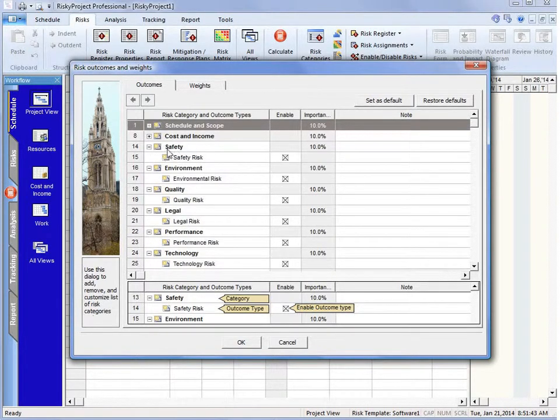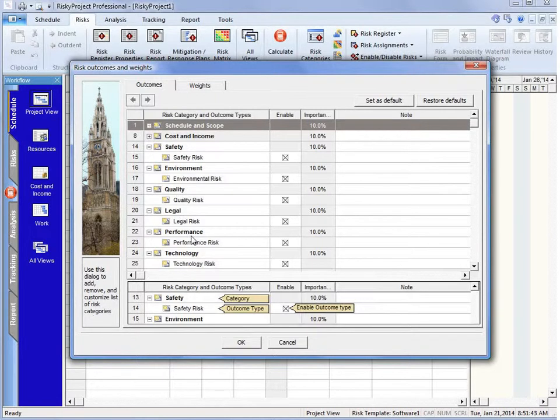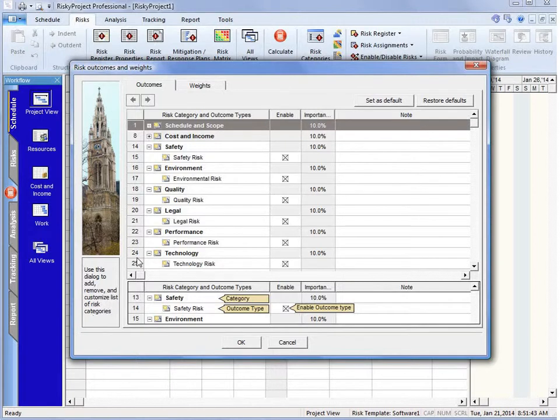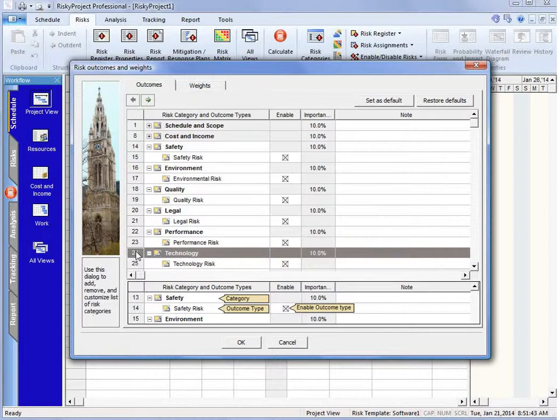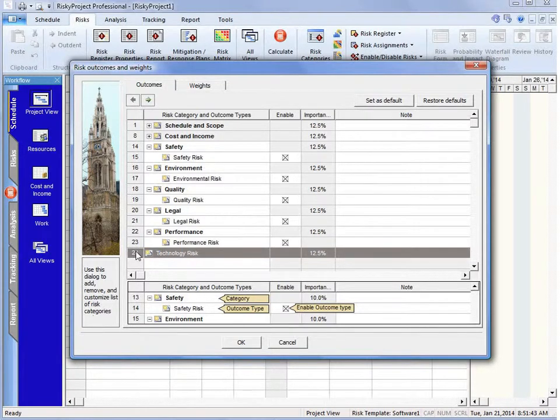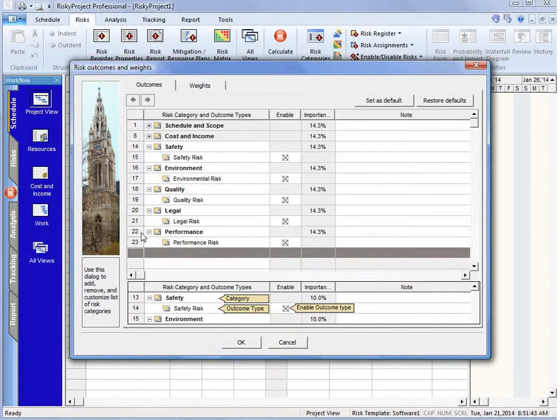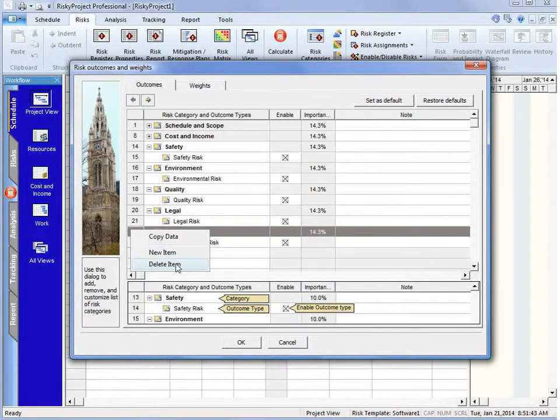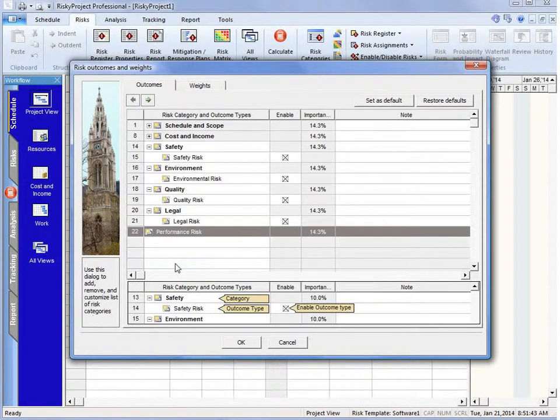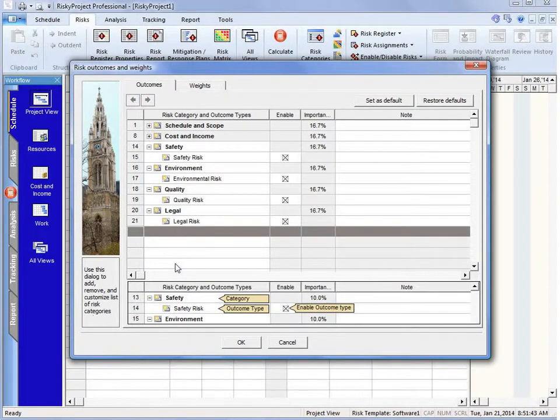But we can see that we have safety, environment, quality, legal, performance, and technology. Now if we don't want one of these, one of the things we recommend is if we're not going to be tracking a particular risk category as part of our projects, we can just get rid of them. And that's simply by selecting that category and deleting, or we can just press our delete key on our keyboard.